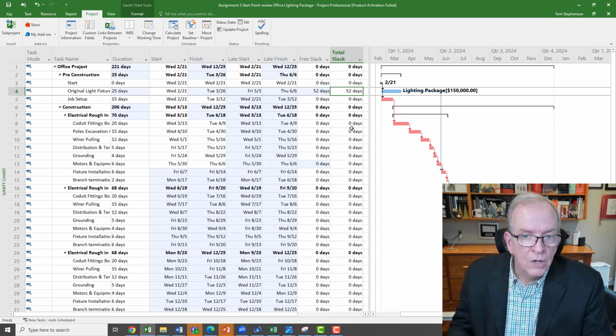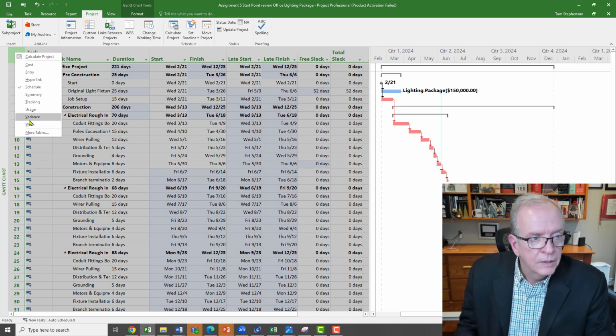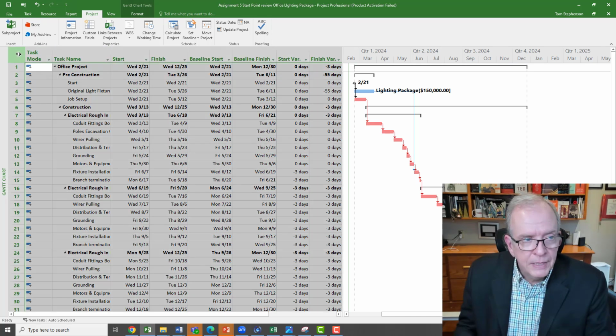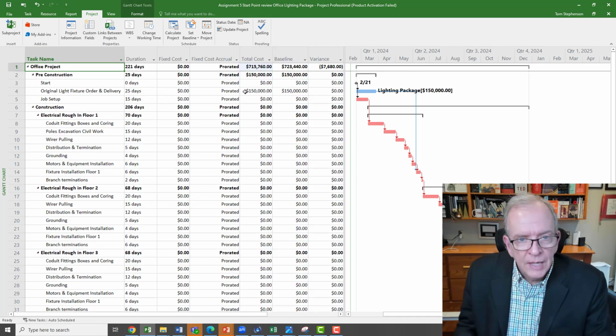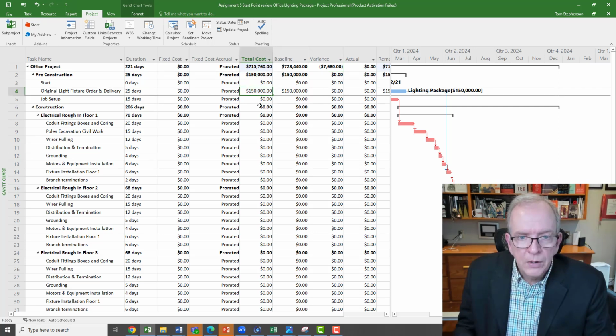All right, so from a point of view on variance, it saved us 3 days. That's a good thing, because if it saved us 3 days, that means our management team, our PM, our project coordinator and site super, are going to be there 3 days less. So that's going to save us $7,680.